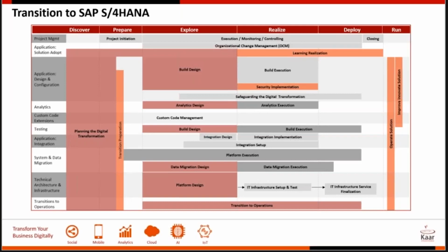This primarily is how you set up each of your S4 landscape systems, the dev, QA, and prod, how you take copies from production, and how you execute your S4 conversion on each of these systems and iterate into the final set of activities that you would do in production in a specified window. And when this is done multiple times, then when you run your production system, it goes smoothly and fits perfectly into the planned downtime window.